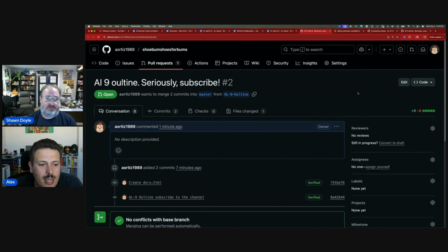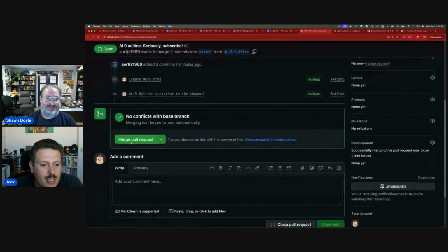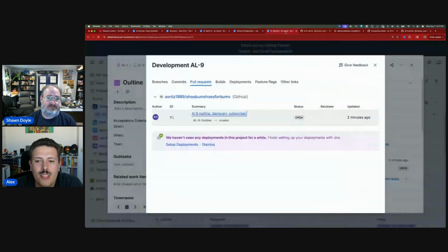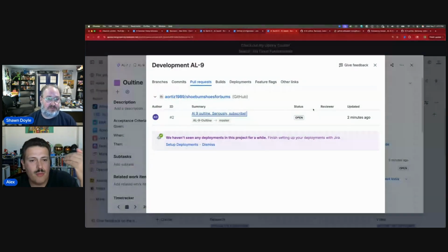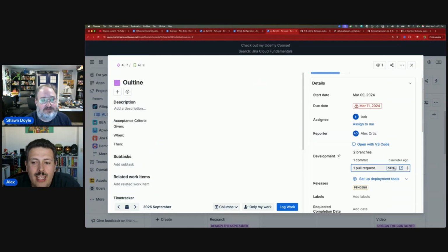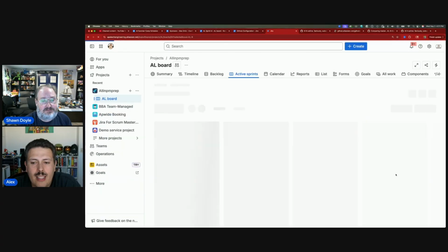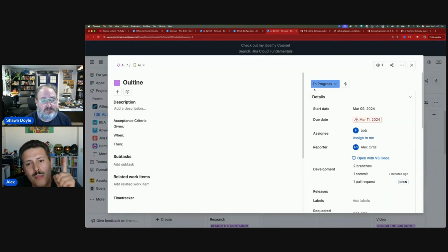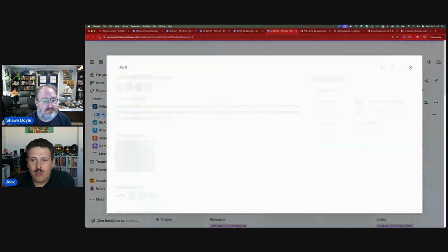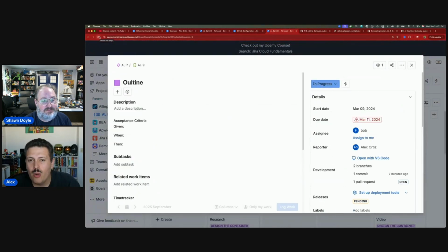And what's also great is if somebody does approve the pull request, you will see it, and there's an automation rule. So if the PR is merged, I can then move it to verification, QA, whatever your next status is. But more importantly, within this view, if I have a story that's in progress, but I have a merged PR, then that means my developers are ahead of where Jira's at. And you want to go follow up with that.